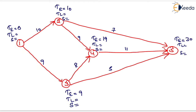If Tl is not given for the last event, it is taken equal to Te, so Tl equals 30 and slack equals 0, since slack equals Tl minus Te. For event 4, Tl equals 30 minus 11 which is 19, and slack equals 0. For event 2, we compare (30 minus 7 = 23) and (19 minus 9 = 10), so we take the minimum value of 10, and slack equals 0. For event 3, we compare (19 minus 8 = 11) and (30 minus 5 = 25), so Tl equals 11 and slack equals 2. For event 1, Tl equals 0 and slack equals 0.